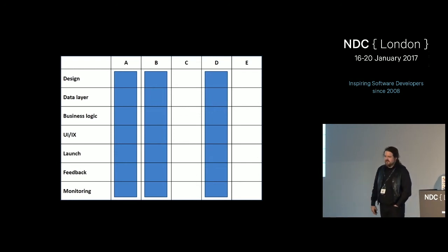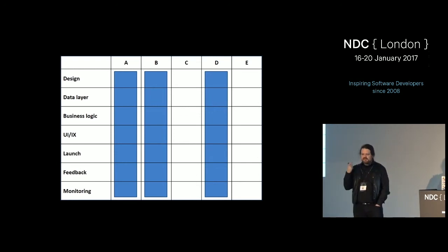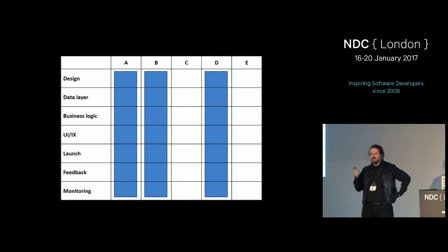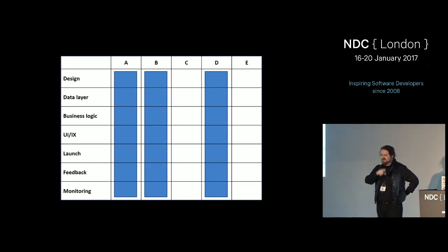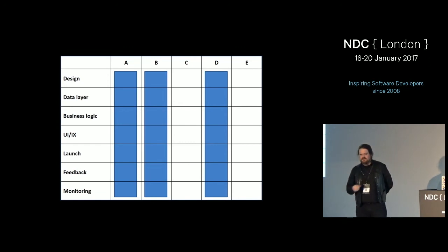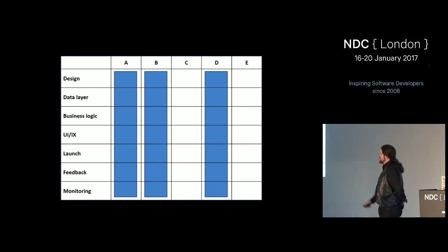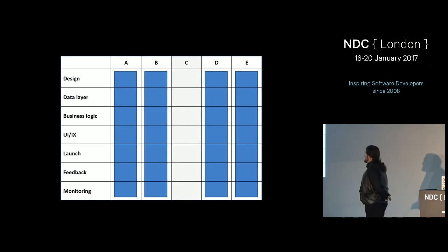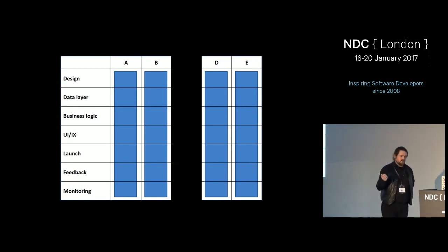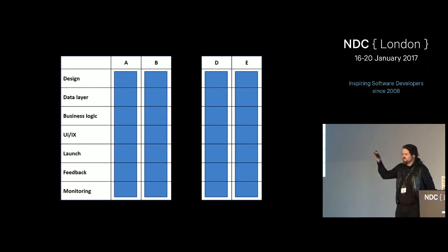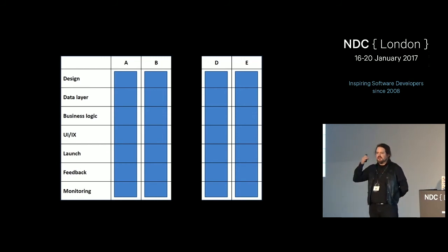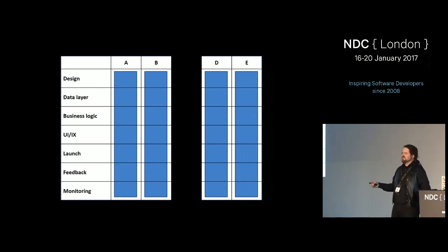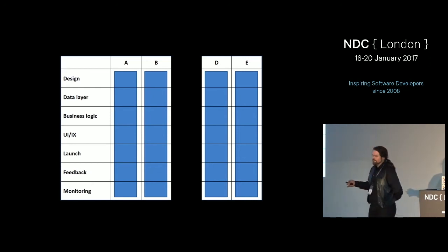And at every stage, you are making sure each iteration of this, each experiment, you are picking the smallest thing that can work, you are shipping it, you are communicating, you are analyzing data, you are going back to the observation stage, and you're feeding that back into the next iteration of your product. Because what you probably find is that you can do D and E, and C, actually it turns out you never needed that at all. You had this entire piece of your product vision that, through repeated experiments, you determined that the hypothesis that said it was necessary has turned out to be false.